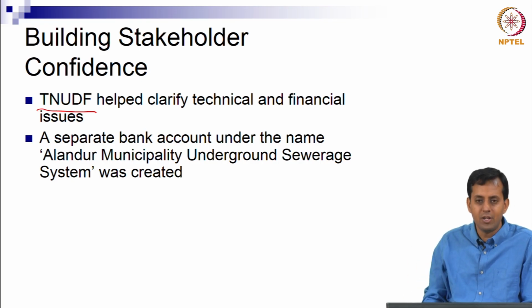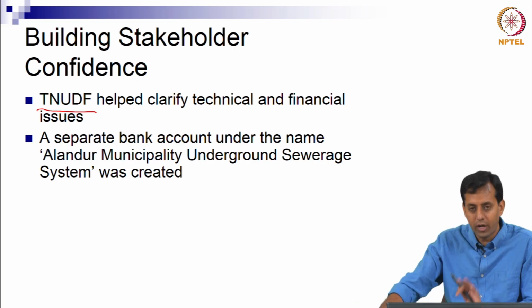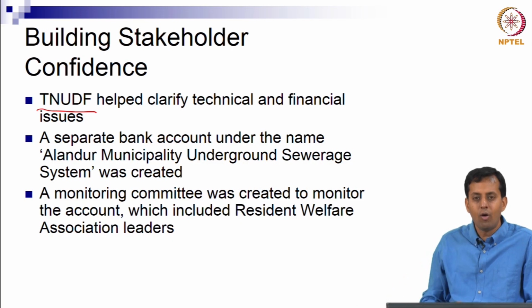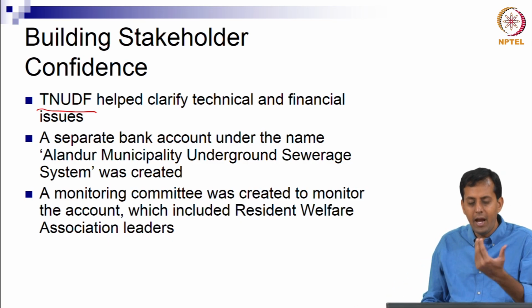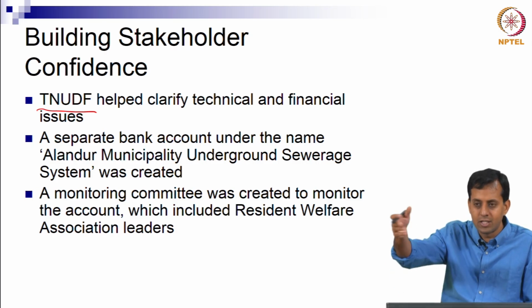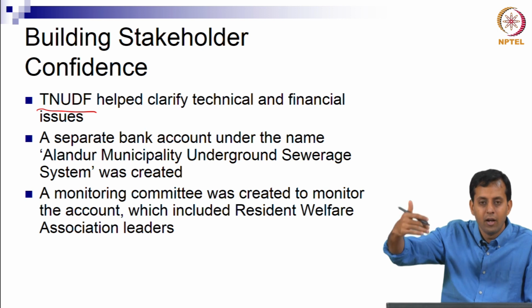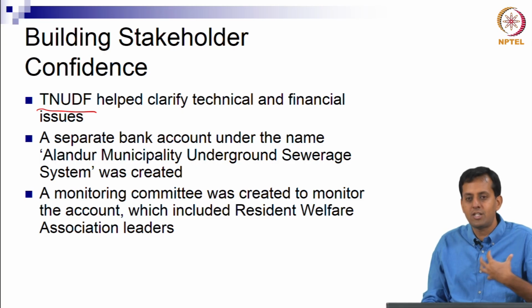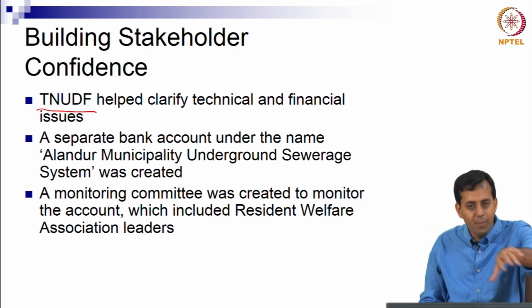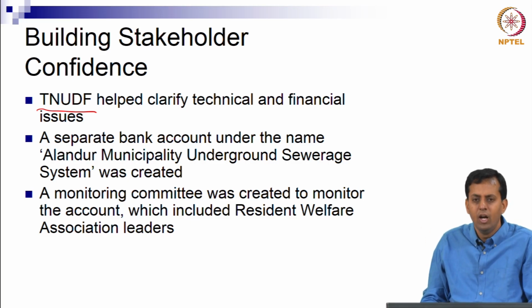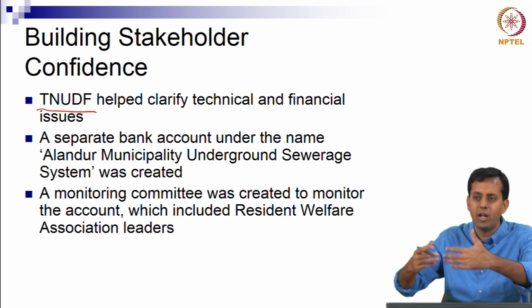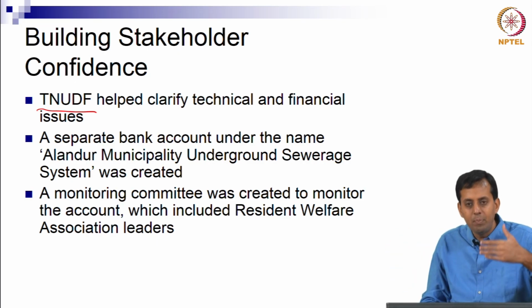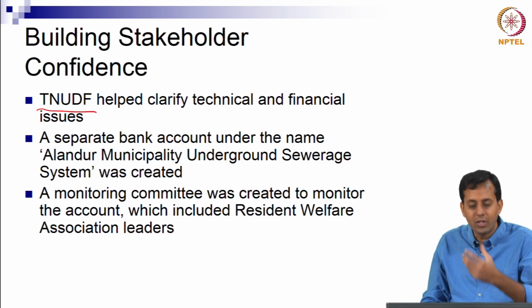Again the question comes in, how do we know this money will be used wisely? Good that you are creating a separate bank account, but how do I know that you will use the funds in this account wisely? So the municipality said, you know what, we will create a monitoring committee and we will take some of your resident welfare association people as signatories to this account. They will be part of the monitoring system. So it's not just us taking your money, putting it into an account and spending it the way we want. People from within the community will actually help monitor. So a lot of effort was put in, and this is not just going out and releasing a press release. This is meeting people, understanding their concerns, working with them and coming up with a system where people first trust the mayor, the municipal chairman and his office.